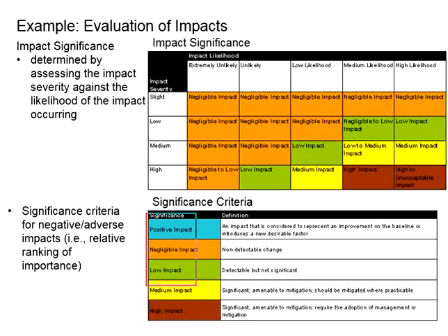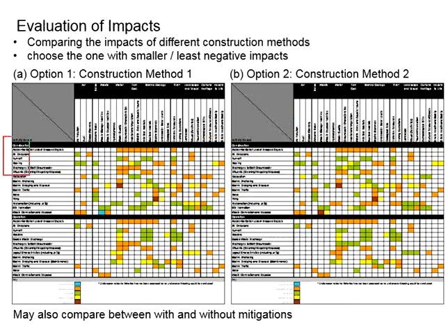Now, having this as the coding system, you may evaluate every single project activity against various environmental components. Sometimes, if it involves comparisons of different construction methods, you may create another EIA matrix so that you can make a side-by-side comparison to determine which method is more suitable for the construction project.